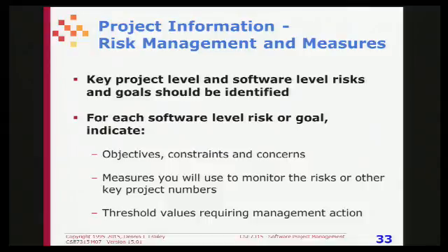That may affect the schedule, in which case it's a project risk. It could also affect the technical performance because the people you replace them with don't have the knowledge to write the code or something, and that might end up being a product-related risk. So one cause could lead to risks in the product area and the project area. But keep in mind the difference. A project risk is something related to cost and schedule. A product risk is primarily something related to performance.